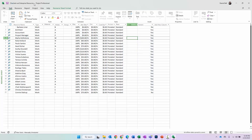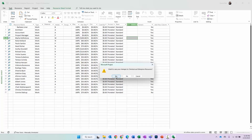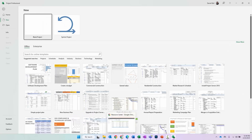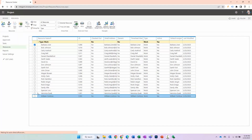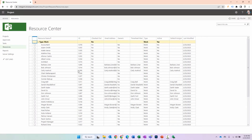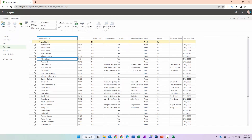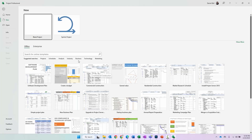Click Save. You can see it says Checked Out in per resources — that means I have the resource pool open. I'm going to select File > Close, save my changes. Now we go back to the Resource Center to refresh, and you're going to see more resources show up. There they are. You can see the ones with actual accounts, and you can see the others — Adele, the generic resource Accountant, Architect, and so forth. That's basically adding resources multiple ways: one at a time, using AD sync, and opening the resource pool in Microsoft Project to paste names in, save, and close.